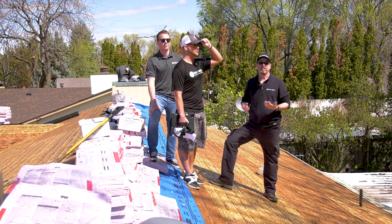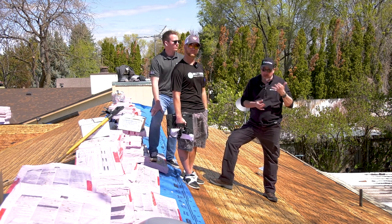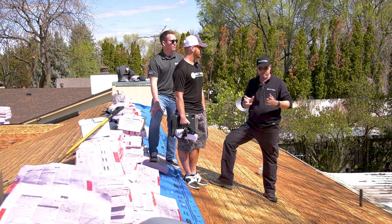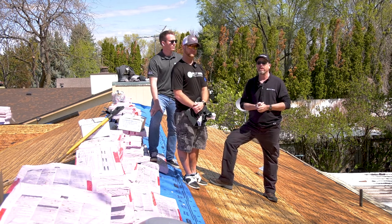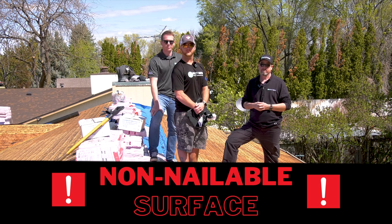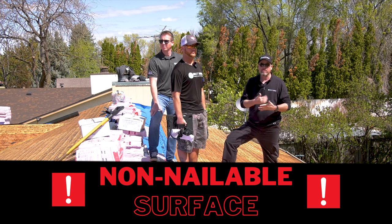Why else are you here? You're the project manager. Manage your project. If there is damage that needs to be supplemented, get on the phone with your adjuster. As soon as you know there's a problem, you should be on the phone. If there's damage to the decking surface, which is why you're up here, you need to be on the phone with the adjuster saying, hey, we found non-nailable surfaces on the roof. And let me be very clear on that: we found a non-nailable surface on this roof.